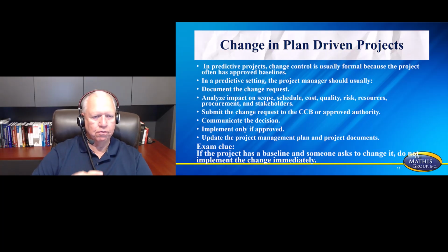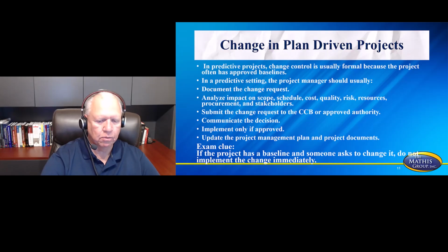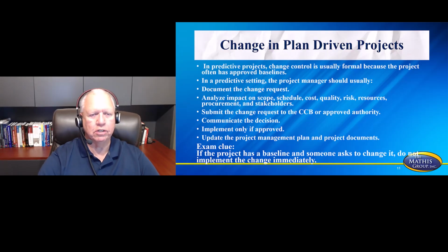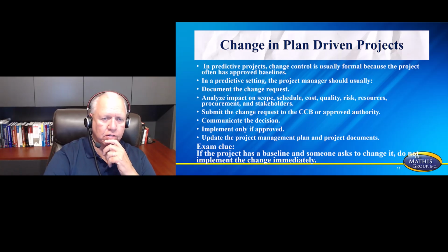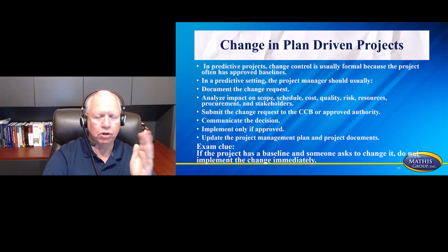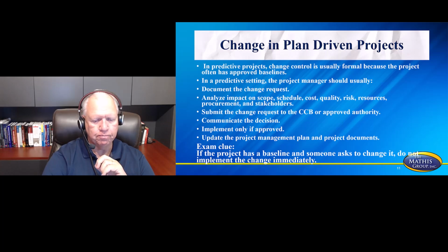An exam cue that will help you: if the project has a baseline and someone asks to change it, do not implement the change immediately. Most of the time we miss a question because somebody requests something and we jump all over it to do it quickly, and that's not typically the right answer, because you've got some analysis that you need to do before you ever make a change on any of these.